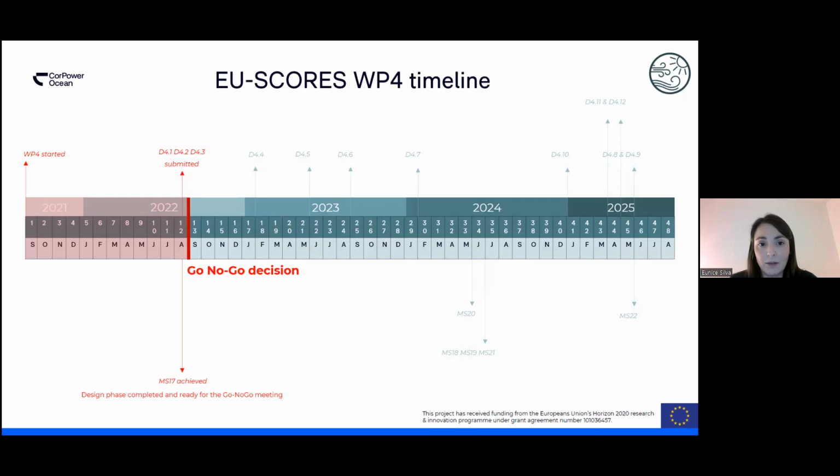In reality, what happened is that by August, 1 year after the project had started, we had completed all the deliverables and milestones, and we were ready as a consortium to give ourselves a go decision. So internally, we reached that conclusion, but we waited a little bit longer to have the final decision with CINEA. I think CINEA, in an optimization of resources and attempting to have our meetings together as useful as possible, joined that go, no-go final decision with the first reporting period, which just happened now in January. It was the first reporting period of the project evaluation, covering September 2021 till October 2022.